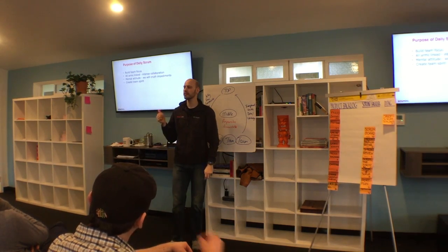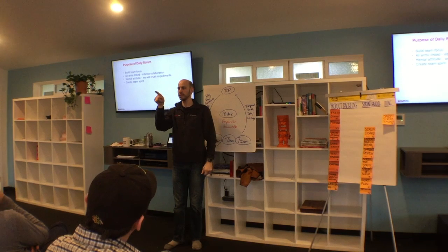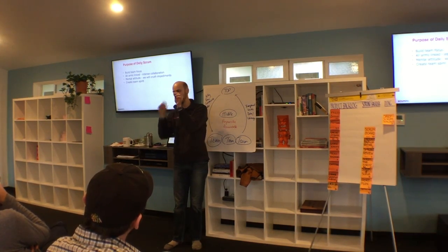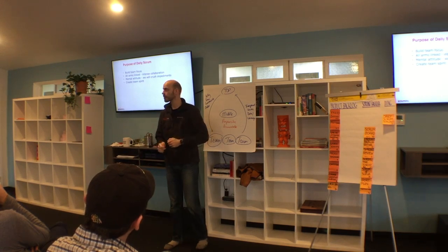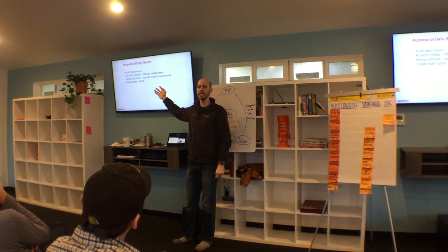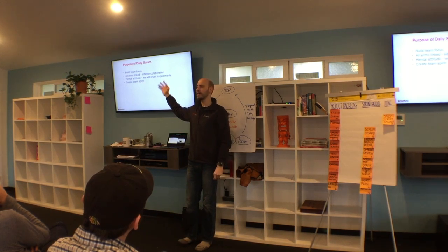Now the purpose of the daily Scrum is to look at the burn down, the sprint burn down, and say, what are we going to do differently today than yesterday to land this on time? That's the purpose. This is the side effect. High performing teams with team spirit and focus, and the opposite of waiting on someone else to remove an issue.